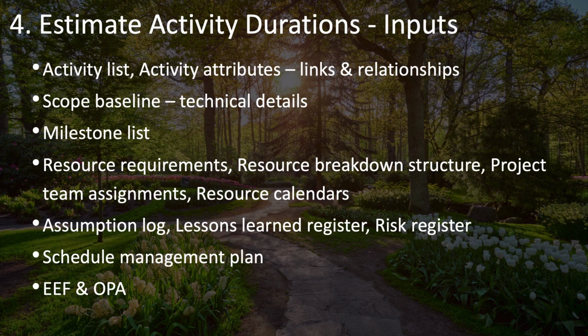The milestone list is also valuable because you may have certain dates that are forced upon you, and that can restrict or constrain some of the durations of activities, and you'll need to adjust your resources appropriately to meet those milestone dates. Which leads you to the next one. You'll need to take a look at your resource requirements and your resource breakdown structure, your project team assignments, and your resource calendars, all of these things that have to do with your resources and their availability. These can affect how long activities will take to complete.